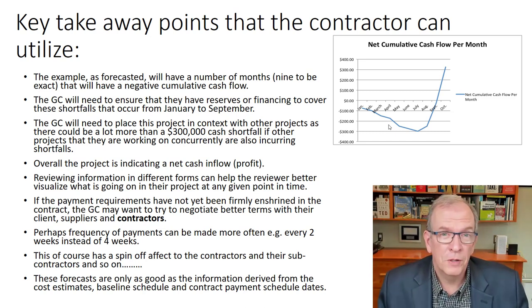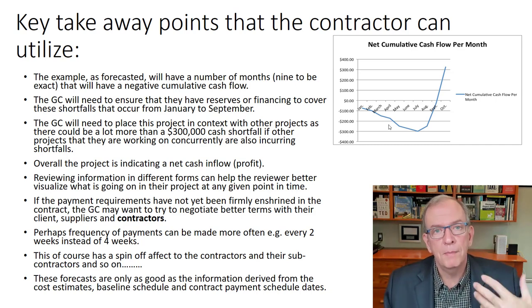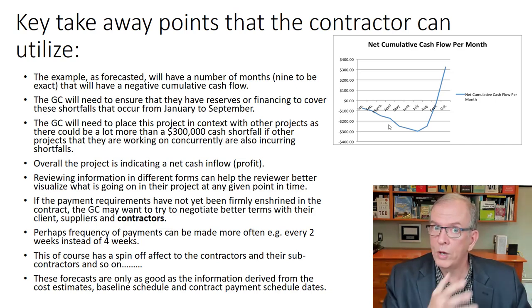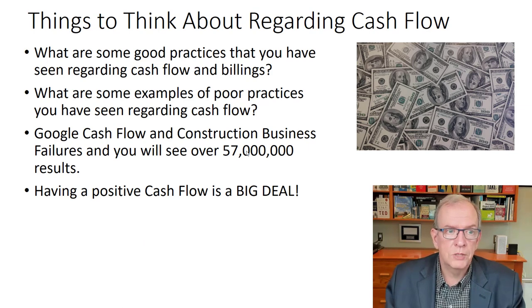That's very important, to be able to develop an excellent schedule so that you can better manage your funds and, of course, better time your work and your employees and better measure your productivity rates so that you have a good understanding of how well you're doing with your estimates on the core part of your business. So the forecasts are only as good as the information derived from the estimates, the baseline schedule, and contract payment schedule dates. Garbage in, garbage out.